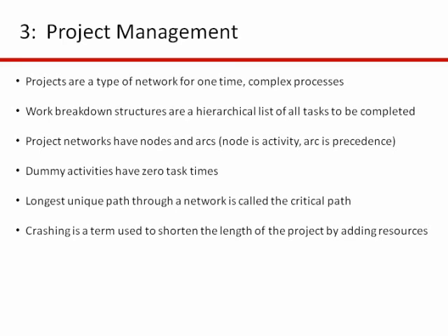All right, and typically when a project team is formed, the project manager will have a brainstorming session with their entire team, and then they'll use those little sticky notes to generate not only all the tasks and activities that all the members think need to be done, but they'll try to put them in some sort of a sequence and then estimate how long it'll take, etc. And so that's basically what a work breakdown structure is.